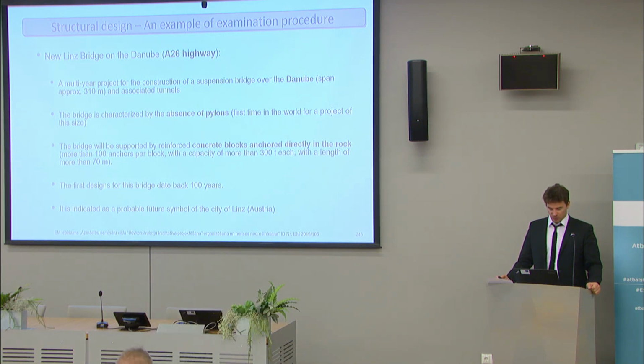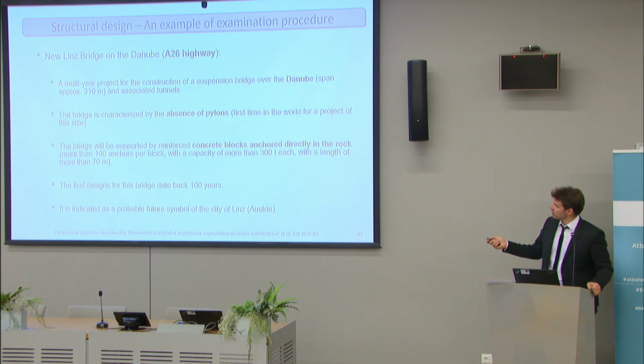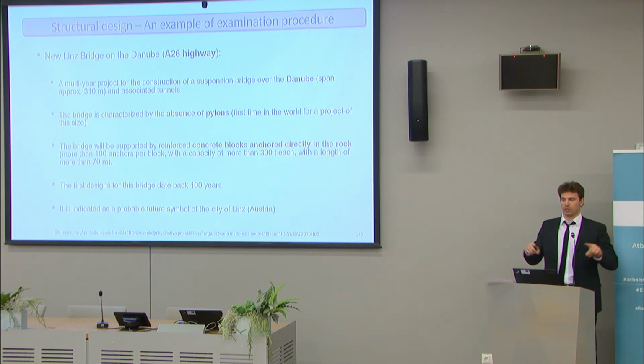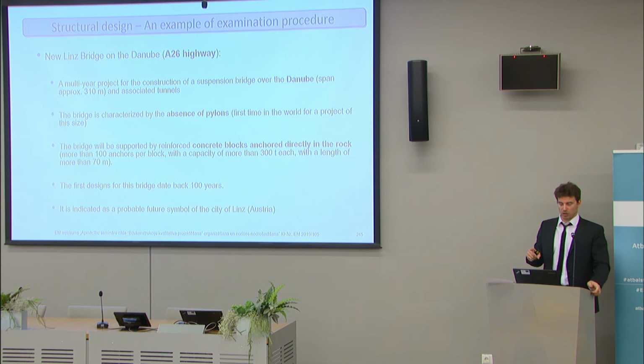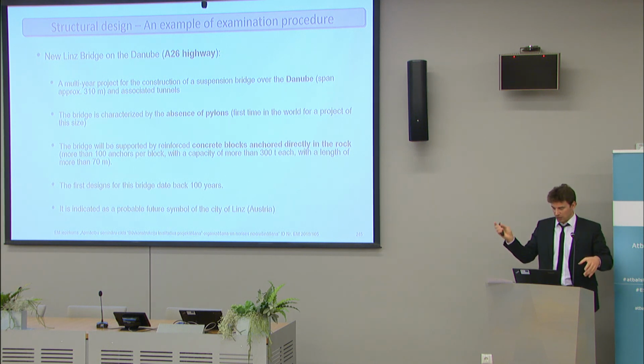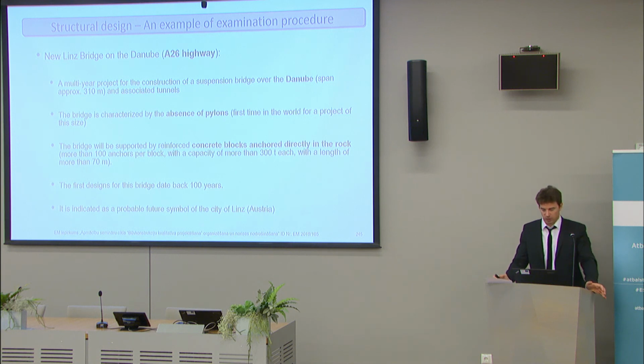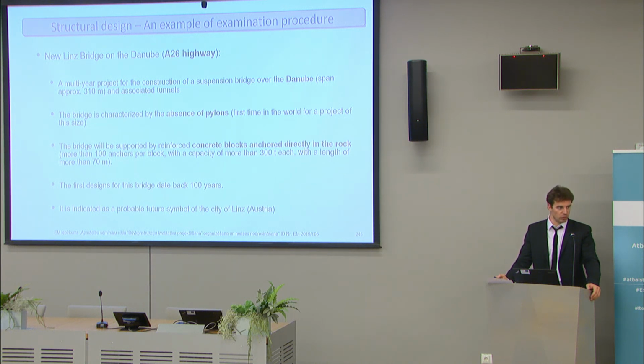So as I was saying, it is approximately 310 meters long. This is just the length of the bridge, but the cables themselves are longer, 500 meters or longer, and these are 8 independent cables that are spanned. And I have some pictures now of how it will look when it is finished, and when it continues like this, I think it is going to be finished by the end of 2022.